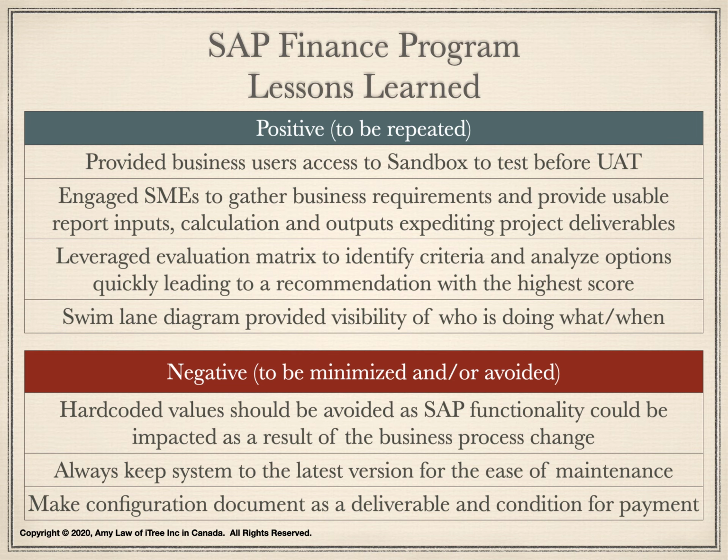Here is a highlight of the finance program lessons learned. A number of positive findings were identified. They are meant to be repeated in future projects. We provided business users access to sandbox environment to test before UAT in the test environment. The turnaround time to move SAP system changes to the test environment is much longer due to the IT process validation and approval. The changes can be made to sandbox right away, keeping the users' interest.